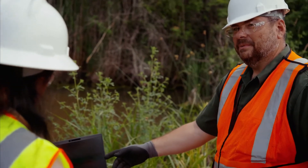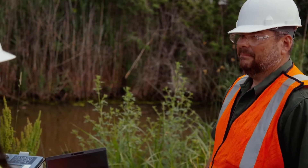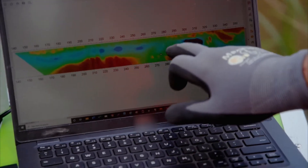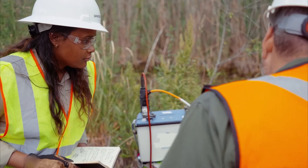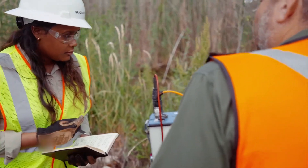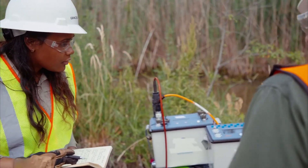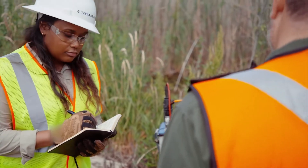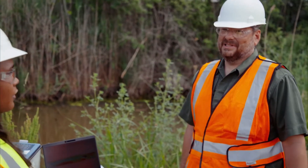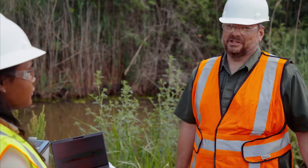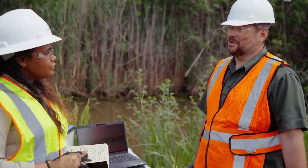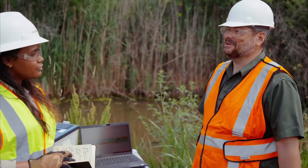This readout shows the differences in resistivity in the subsurface. We can predict the properties of the materials based on the resistivity readings. You definitely have some significant pockets of groundwater, and I think I found your fat clay. And it looks like we have some sort of buried structure over here in the southeast part of the site — you'll want to investigate that further. Now you know where you need to drill to get really specific data, and I found an issue you didn't know you had. I probably just saved you three months of work and a change order in one afternoon without even disturbing the site.